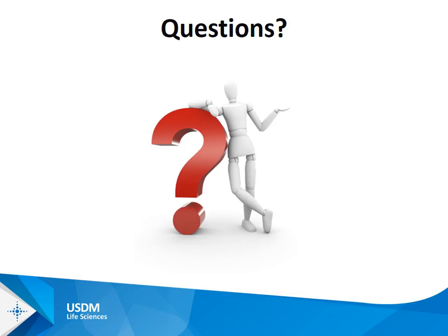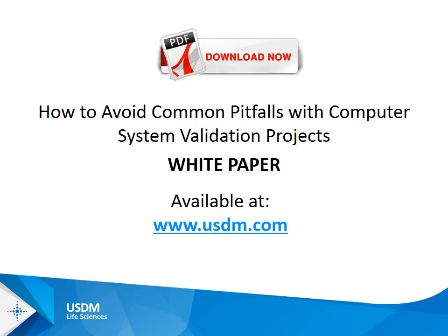And Larry, I'll start off with just offering USDM, our team at large, when we are preparing to assist a client with a project, validation or otherwise, we have a meeting that really talks through the plan of attack or the plan of approach for every step of the project. This is done even while we're scoping the project and presenting our statement of work. Every step is defined as this is USDM, this is the client, this is the PM, this is the validation analyst, and every step is clear up front in the project, so then you can talk it through as you're planning and preparing for that.